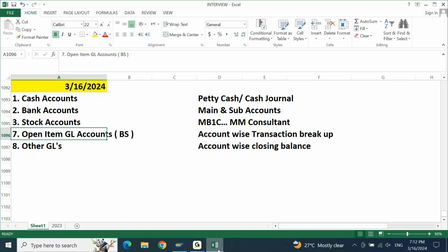You need to note down each and every issue, even if the user is raising a query that the period is not open, wrong GL account is selected, or amount is posted wrong. Any issue that is reported to you must be logged. In an Excel sheet, issue tracker, or issue log, you have to record every issue that you have received during your hypercare period, and then the solution that was provided.